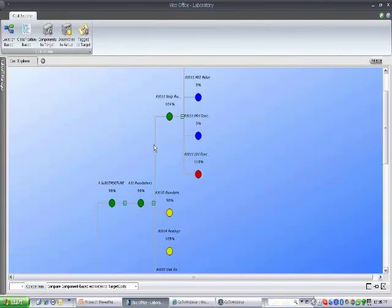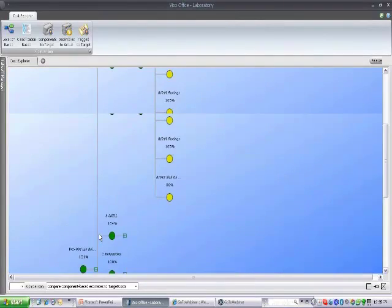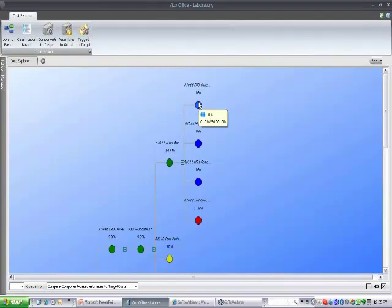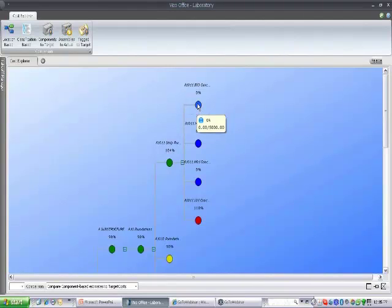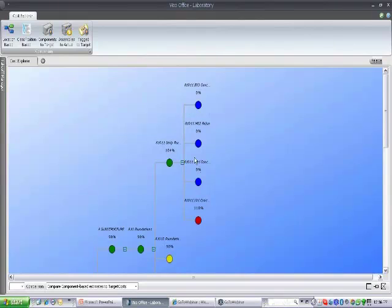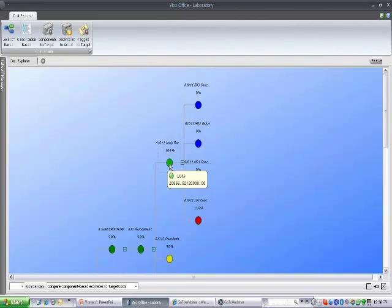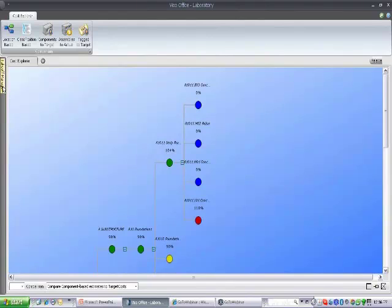In this case, I'm over budget on my labor estimate, but generally I'm still doing okay on the entire estimate. However, I have not priced the concrete material, rebar, and concrete equipment yet. So I would need to price these. I might go over budget. In that case, this node would automatically turn red and I'd be able to communicate that change to the client right away.